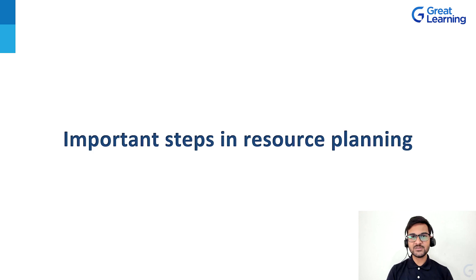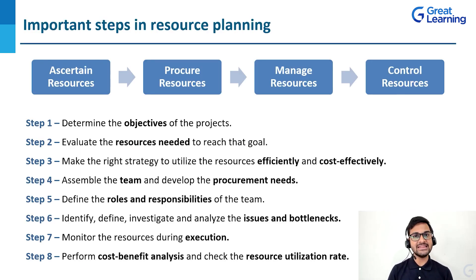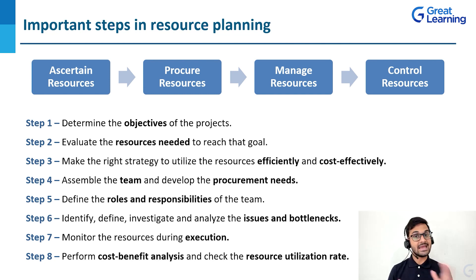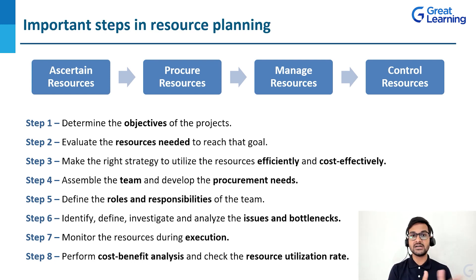Now let's see what are some of the important steps in resource planning. Broadly speaking, there are four steps. Step one is ascertain resources — you need to know what resources are required to perform that particular project. Step two is procure resources — as seen in the IT industry example, the project manager understands the client's requirement, gets to know the resource demand, and escalates to the resource manager. Step three is manage the resources. Step four is control the resources based on how far we are from achieving our goals, whether we are over-using or under-using resources.